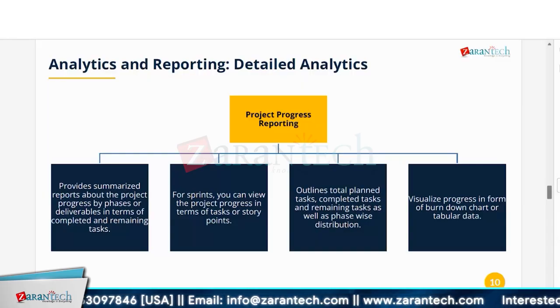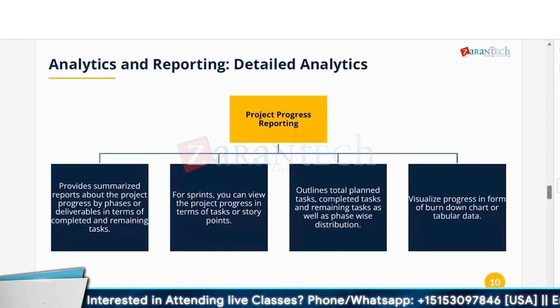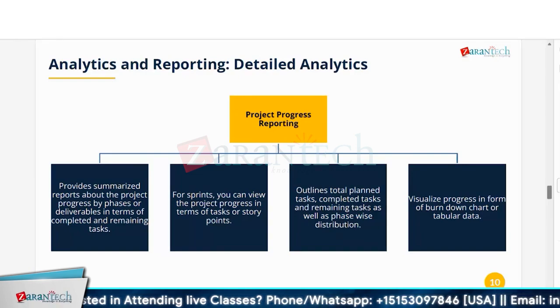It will also show you roadmap tasks, right? Which come with the roadmap. So those tasks are there by themselves. If you're not using them, they will show up as unassigned, right? So it's fine whether you want to use them or not, but it will show up in your reporting, right? And obviously, you can apply a user filter and strike it out, saying I don't want to see roadmap tasks because I'm not using them. And obviously you can visualize them in the analytics tab. You can have charts, burndown charts, and tabular data, whatever you feel like.